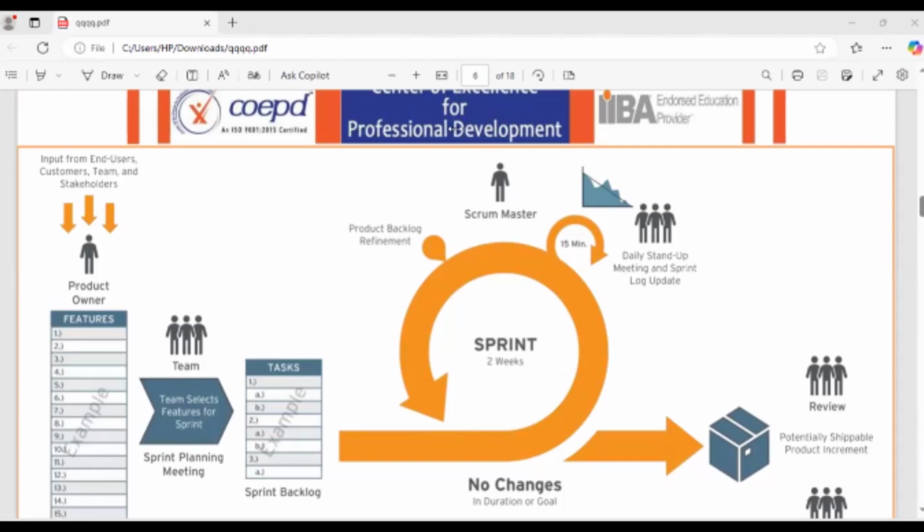He will try to analyze the progress of the sprints. He will generate different kinds of charts, like the burn down and burn up charts. The burn up chart shows which user stories were completed in a particular sprint. The burn down chart showcases the pending story points, the user stories still pending in that sprint. Complexity points and story points are the same.